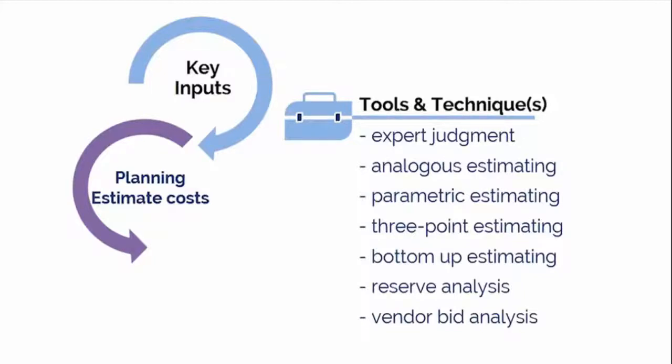One way to estimate costs is to look at what the project should cost by obtaining and reviewing bids from qualified vendors. For example, you plan to buy 10 computers for the project, so you ask vendors to submit bids. The cost estimates you receive from the vendors can help you in developing a realistic cost estimate for the project.